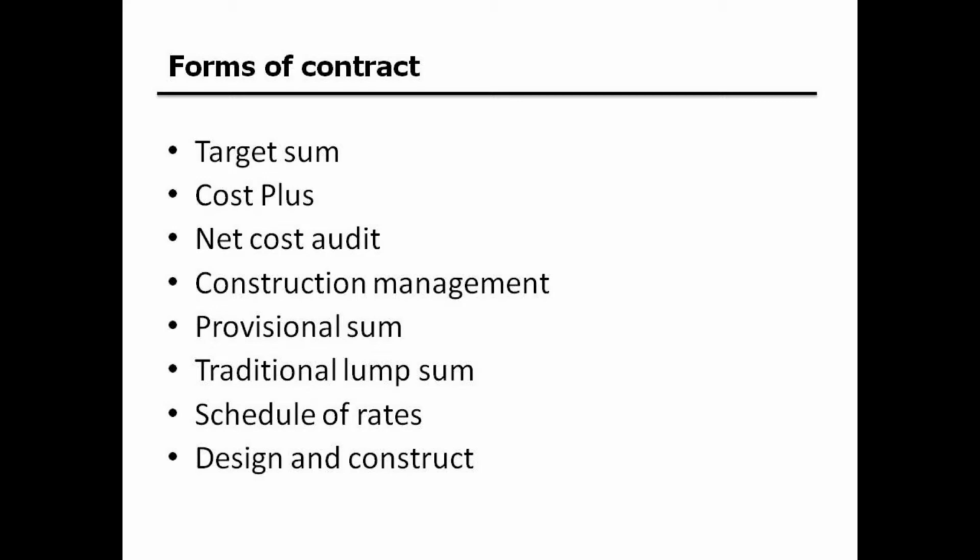An estimate and scope is derived from sketch plans. It's quite difficult because it's really not competitive due to the amount of risk the builder has to take on board, the risk of the unknown with the sketch plans, associated with the additional risk of having to deliver this project at a guaranteed maximum sum.